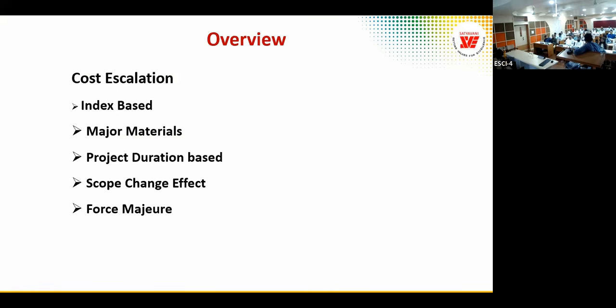Yeah, in Maharashtra, we have 85%. So nature of work, the right situation. They are given only 85%, actually good. Yeah, they say 85% of the component will differ in prices and 15% will not. The 85% multiplication is taken by deducting the contractor's profit. Exactly. 15% is overhead and maybe fixed.